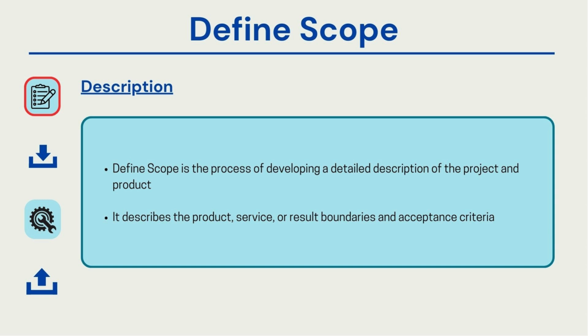The customer acceptance criteria for each deliverable produced at the end of each phase must also be explicitly captured. For example, when discussing acceptance criteria, if a requirement specification document is one of the deliverables, there must be agreed upon acceptance criteria. It must be clear when the document will be signed off and what conditions it must meet to be considered complete. These criteria need to be explicitly documented as part of defining scope.